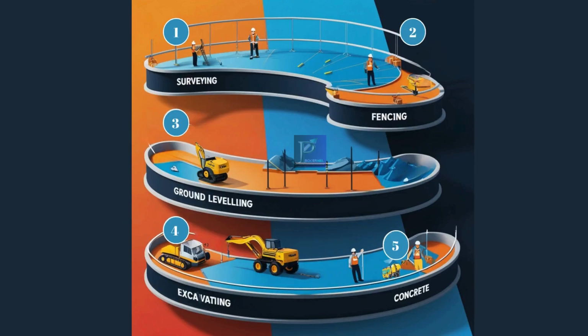The construction sequence starts from land acquisition, surveying, fencing, ground clearance, then excavating, formwork erection, then concreting as per the blueprint. To be noted, there are many processes involved in between, such as procurement, material testing, statutory regulatory approvals, etc., which we are not covering here.